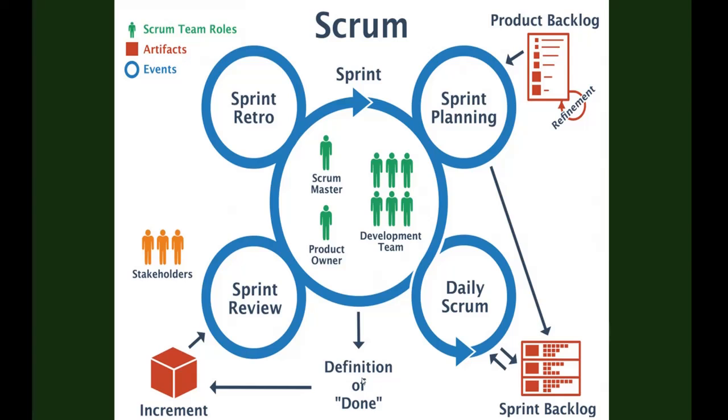There is a term called definition of done, DOD. DOD means they have a certain checklist. For example, you build a website, then they check that the home feature is developed, there are no bugs, the software is running smoothly, and there is no loading issue. So there are criteria they need to inspect for the deliverables, and this is called the definition of done.